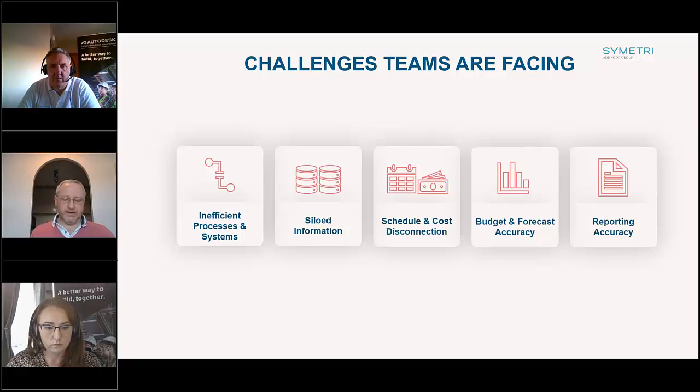So they'll manually bring in information from the estimating package, and that's a one-time transfer. It's very manual, and then trying to manage that through the changes that necessarily happen in a project, through variation orders. Anything that can happen on the project can impact what that cost picture is going to look like at the end, and that makes it a very manual process.